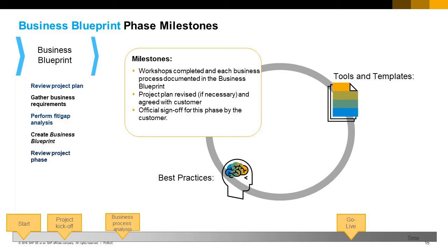The functional lead from the business area should attend the relevant workshop, also someone from accounting. In the workshop you should ask the functional leads to describe their existing process and operations. You can then demonstrate these processes in the system.